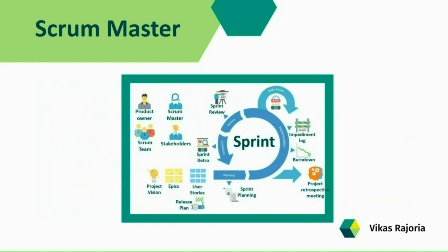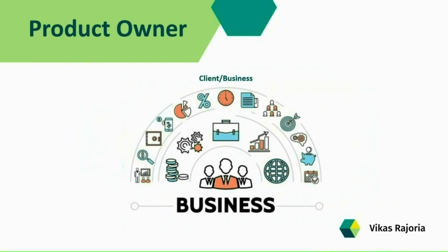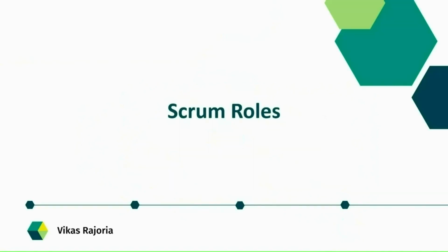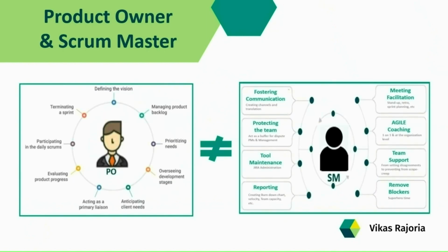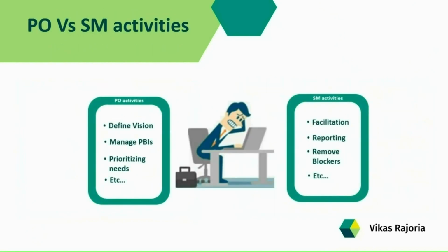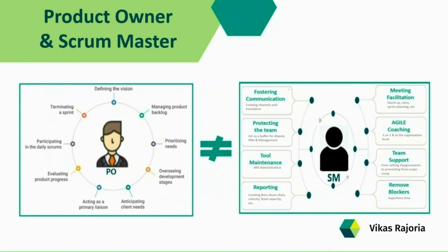That means the Scrum Master focuses on making a Scrum team work, whereas the product owner looks at the entire product backlog items and works more closely with the business or customer. So the product owner needs to have a good understanding to ensure things go well. But the most important thing is that these two roles of Scrum Master and product owner cannot be merged with each other because they have two different angles, two different dynamics, roles, and different responsibilities. That simply means accomplishing both things by a single person may become very challenging and conflicting, and task prioritization will become very difficult for him.